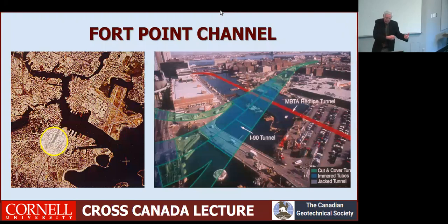And then on the left bottom corner of this picture, the excavation or the construction had to go underneath the railroad tracks at the Union Station there. And to do that, there was freezing of the ground and then jacking of these enormous boxes into place. And of course, stabilizing the central part was critical for getting these other two innovative approaches into place. This actually reduced the cost by about $1.2 billion, putting that back together in this way.